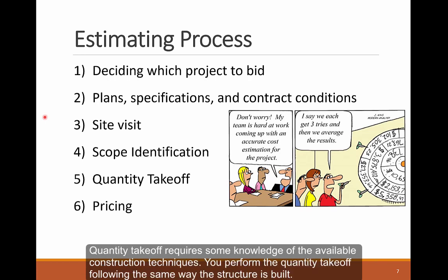Quantity takeoff requires some knowledge of the available construction techniques. You perform the quantity takeoff following the same way the structure is built.